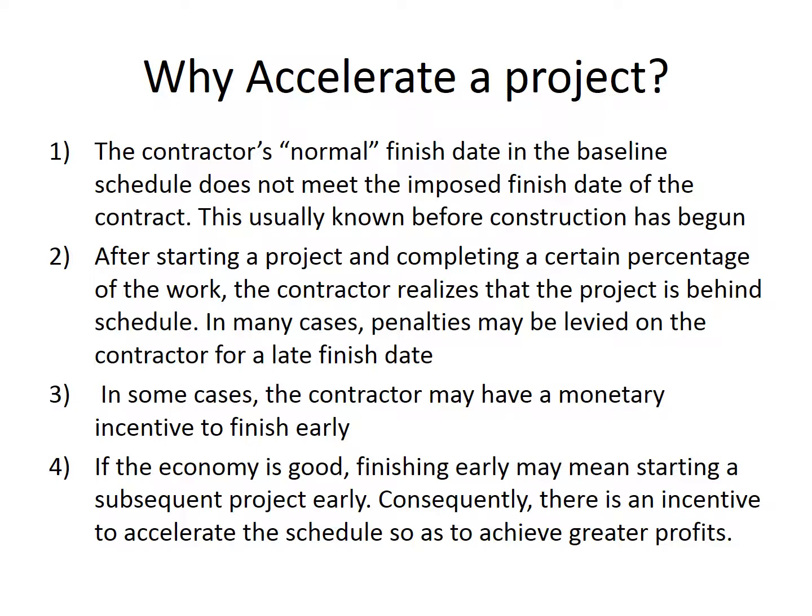Why would you accelerate a project? One, the contractor's normal finish date in the baseline schedule does not meet the imposed finish date of the contract. Sometimes that's known before construction. I can think of several projects that I've been on where we didn't have a contract with a subcontractor, and we ended up purchasing some of the equipment that had super long lead times, so we could effectively meet proper milestone dates. So if the date is already unrealistic, then you have to look at a way to accelerate the project.